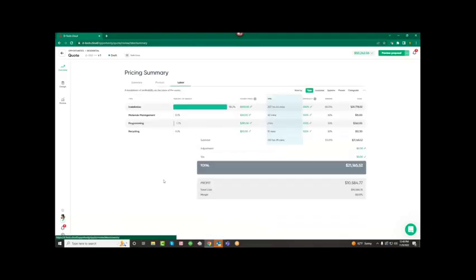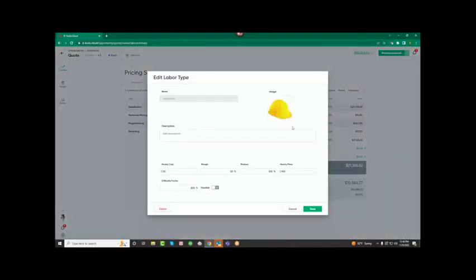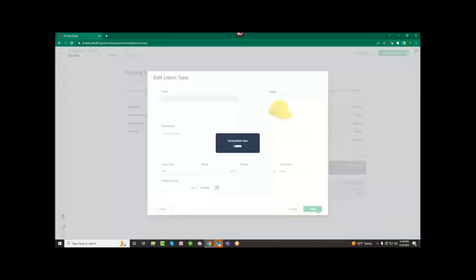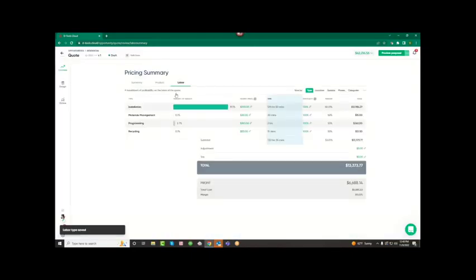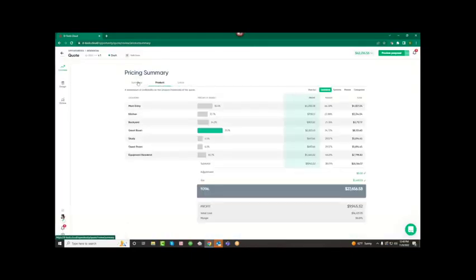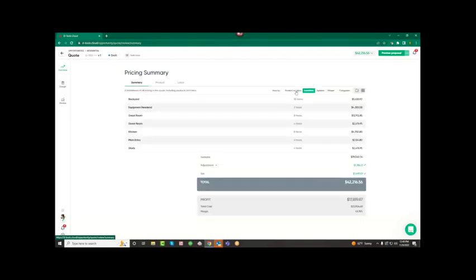So to get closer to our target, when we doubled it, we went up by 15%, right? So maybe we go to a difficulty level of 125 or 150, and that helps us get closer to that goal. We want to show you how this is done. You're going to go back and forth a little bit to see, hey, how close can we get to our goal?